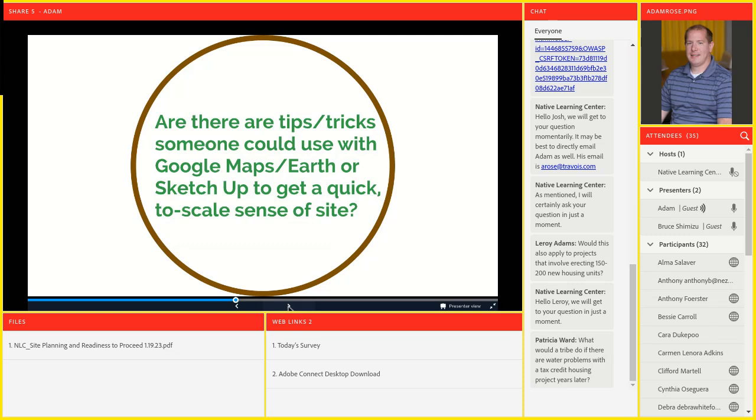We could do this a slightly different way. But that huge mock-up on the wall with handwritten notes and notations became extremely valuable because it gave everyone a centralized location to start identifying risks. People would have conversations and say, oh, I heard that a while back, we had to do some environmental work because the property adjacent used to be an old dump. Then they would start digging into that more, and they would make a note of all these different risks for the property. And it became this priceless tool for them to get this thing off the ground and start communicating with each other.